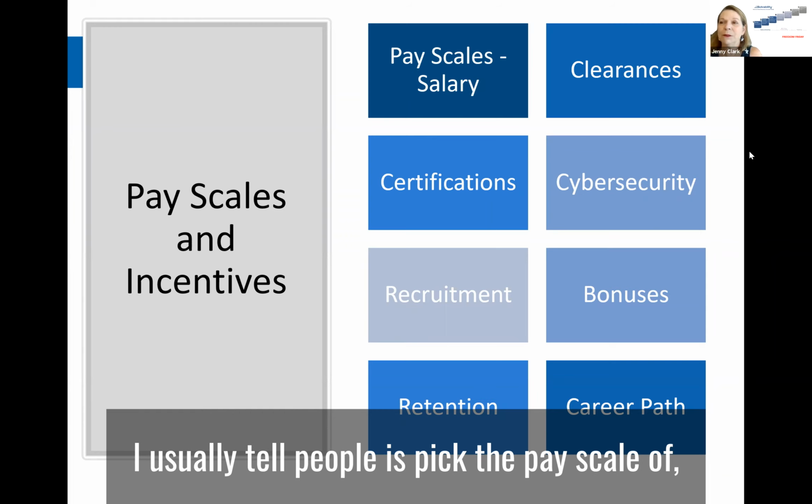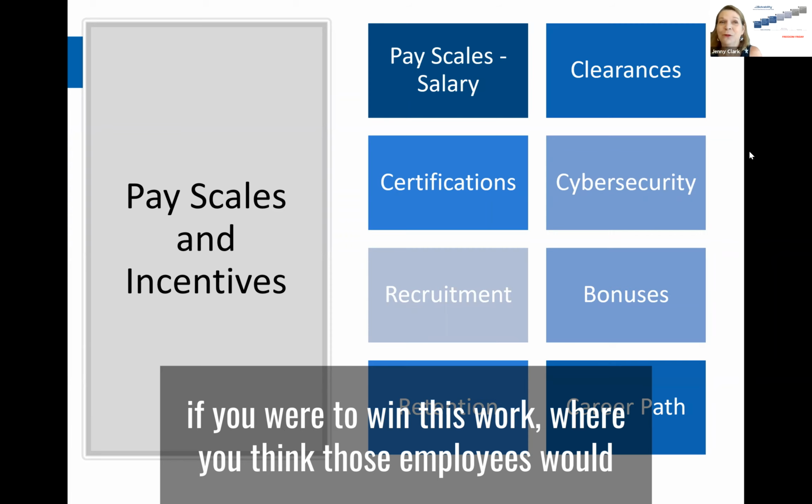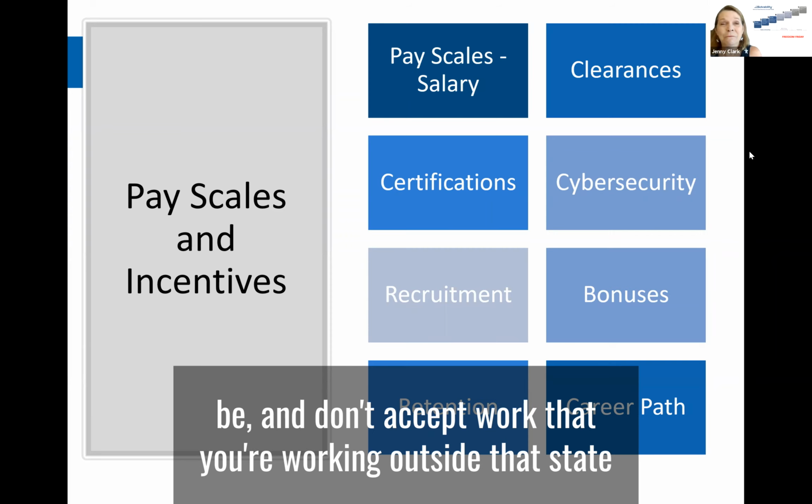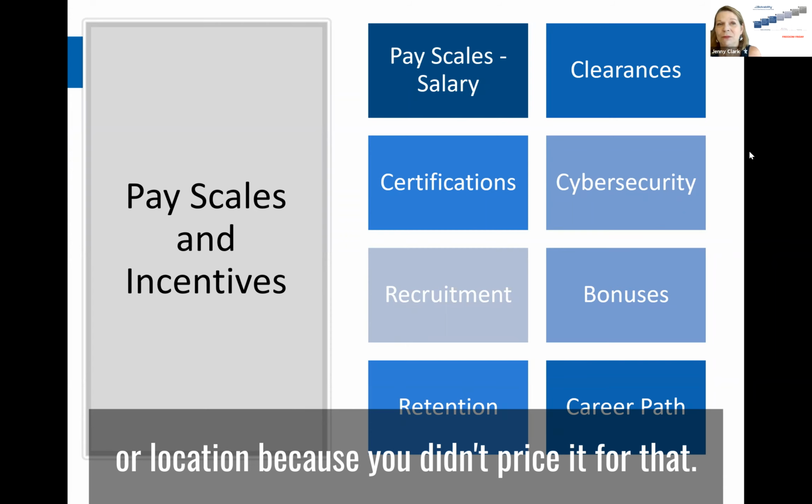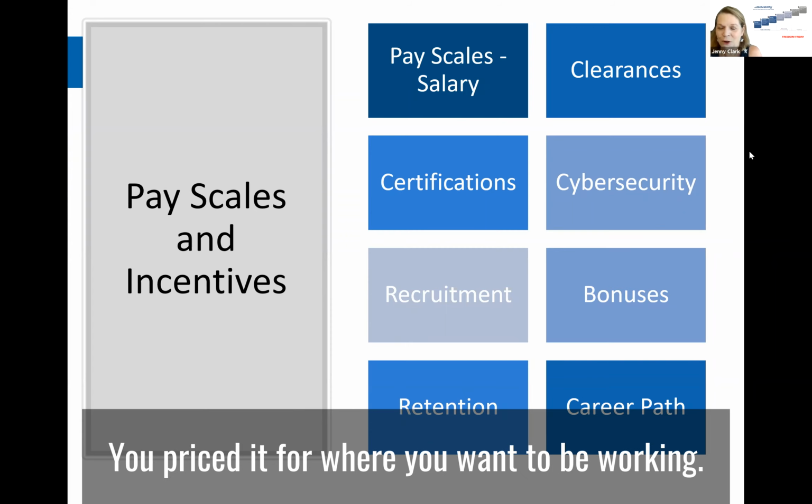What I usually tell people is pick this pay scale of, if you were to win this work, where you think those employees would be, and don't accept work that's outside that state or location because you didn't price it for that. You priced it for where you want to be working.